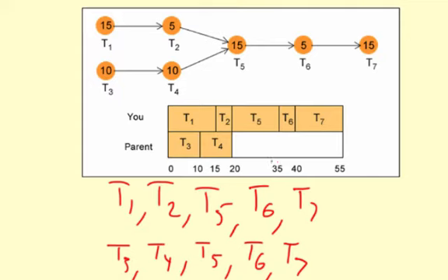Okay, so if you're going to make a schedule, which critical path would you use? Well, normally you would look at your priority list and see which task is a higher priority to start first. In this case, we don't have a priority list, so I'm going to choose the number with the lowest index, which is task 1. So we would use this critical path right.